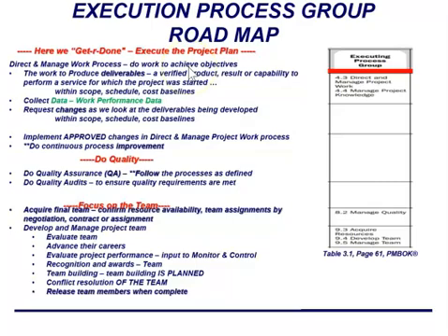You're also going to say, hey, what kind of changes should we request to really keep this deliverable on track, right? And so any change would go into integrated change control, and if it's approved, it would come back into execution here, into direct and manage the project work. It's coming back here to get implemented.